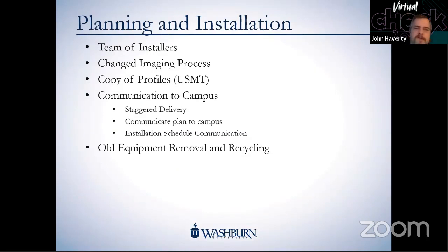So now we have the computers that are coming to campus. The lease is in place, it's been ordered. We changed our process slightly in how we did the installs. Before the lease, we had all techs involved in the process. When we have so many computers coming, we decided to change it and have a team of installers.